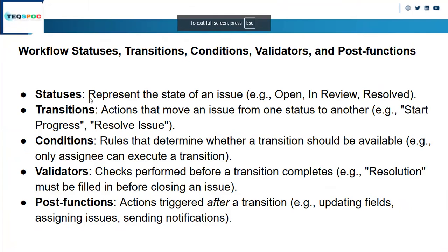Now, what is a status? Status represents the state of an issue: the state your issue is currently in is its status. What is a transition? Moving from one status to another is a transition. What are conditions? Conditions are basic rules you implement on a transition while moving from one status to another. Now, validators. Validators perform checks before the transition completes. You validate before moving from one status to another. For example, resolution must be filled in before closing an issue.